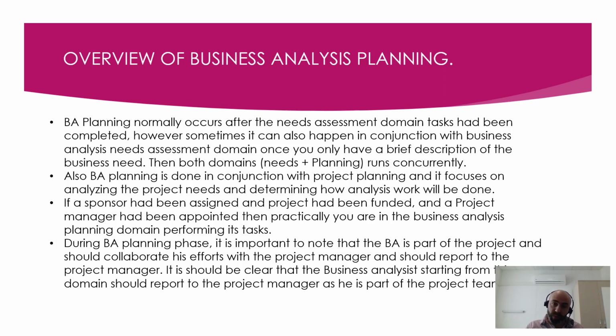Before the business case, there is no project manager yet, so the business analyst is not part of the project and has more authority, let me put it this way, because there is no project manager. But once in the business analysis planning phase, there is a project manager. Therefore, the business analyst becomes part of the project team, which reports to the project manager.